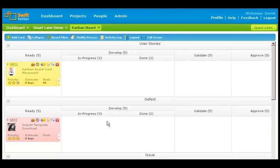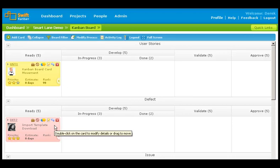If you have enabled smart lanes based on card type, you cannot move the card from one smart lane to another. That is, a user story card cannot change to a defect card.